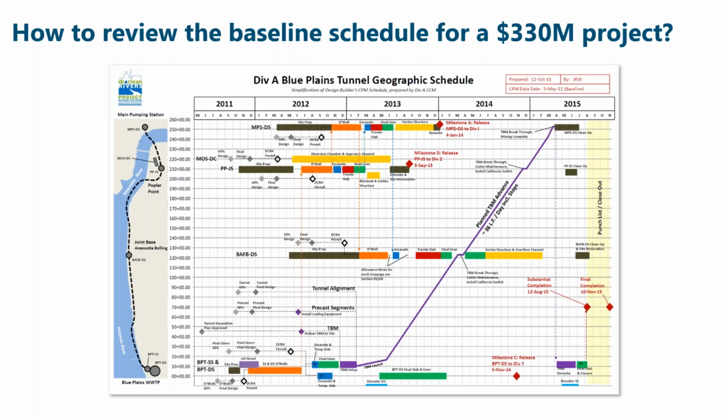And when we received the baseline schedule, it's similar to the problems I was explaining previously, where it's very difficult to understand in Primavera P6 printouts, right? We had 3,000 activities to look at, and we needed to understand it. So we put this into a linear schedule format, very similar to the first example I showed you of the tunnel. And all of these bars represent the work to construct the shafts that I just showed you in the photo. And then you can see there's shafts along the alignment at each location.